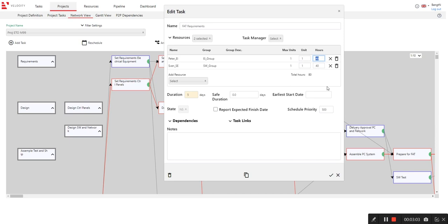He's just going to review some documents and give some insights. So I change him to 10 hours. It's immediately calculated that this is 0.25. And if I don't like 0.25, I can change that to something like 30%, and it will calculate the hours instead.